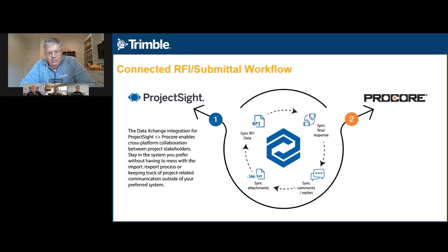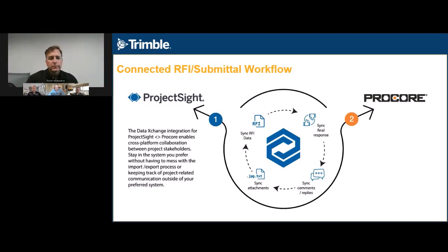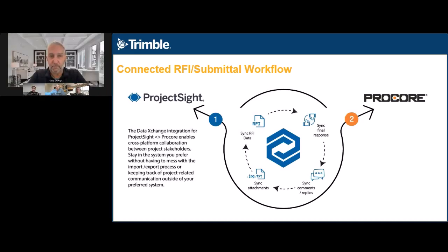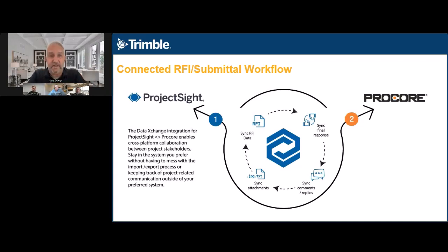And Betty, you're exactly right. It also has to do with accuracy. I'll tell a quick anecdote. We had a customer using ProjectSight that was using the owner system of Procore, and rather than the team operating in ProjectSight and re-entering in Procore, they just used Procore. Mom and dad got divorced, had a claim. They're stuck there holding nothing. They get cut out of the owner's system, and that's exactly why this integration exists, and Matt, why you need to have your own system.